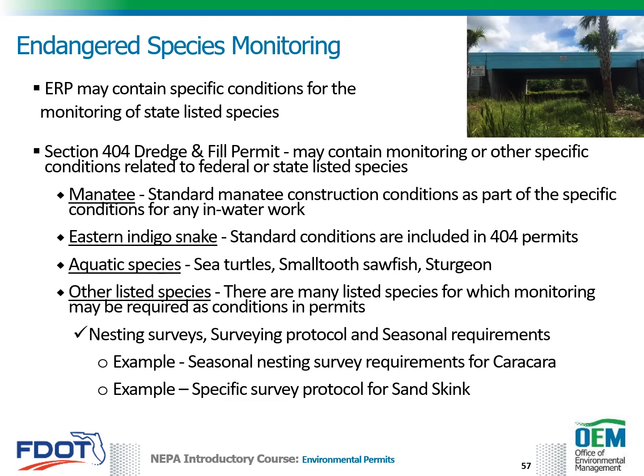Several aquatic listed species have a set of specific construction conditions included in the dredge and fill permit. These species include sea turtles, small-toothed sawfish, and sturgeon. There are many other listed species for which monitoring may be required as conditions in state or federal permits. This monitoring is generally focused on nesting surveys, but may include other surveying responsibilities as well.